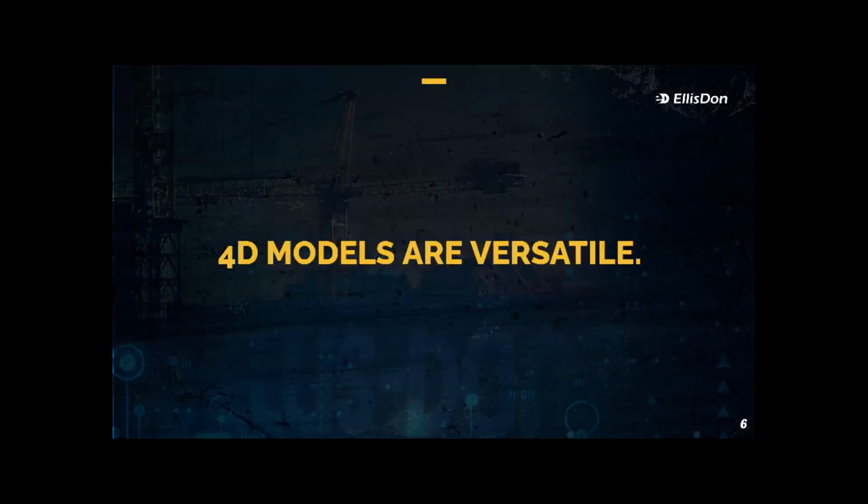Something I want to emphasize is 4D models are very versatile. When you're creating 4D models, you don't necessarily need all the information that I might be mentioning throughout this presentation. You don't need a full schedule. You don't need a 100% completed schedule. You don't need a 100% completed logistic model. 4D models are there to be implemented early on so it can keep up with all these changes and not so much jumping ahead, trying to make the whole model from scratch. It's a lot better to have them involved early on so there is room for movement.